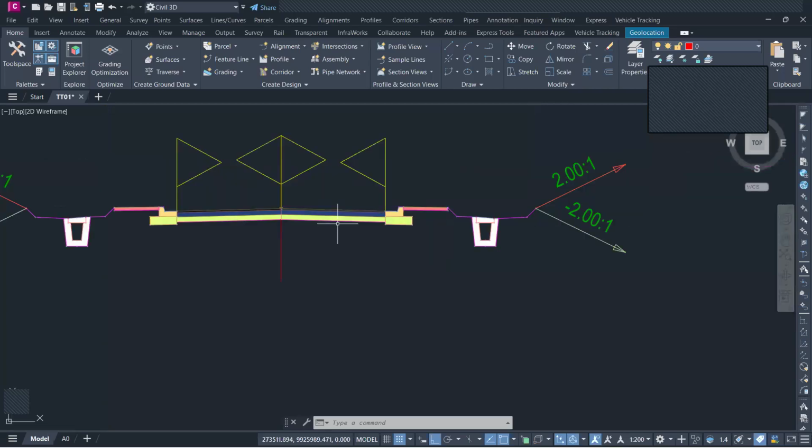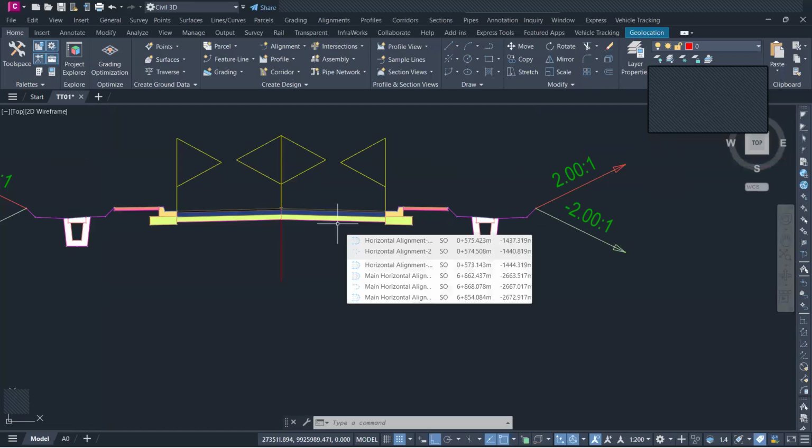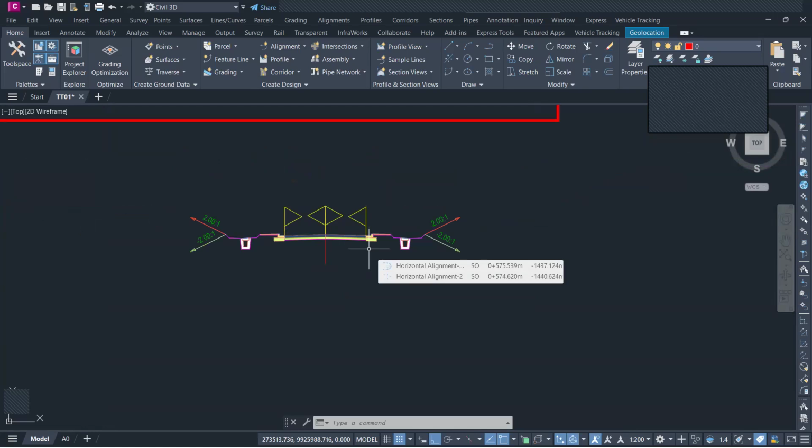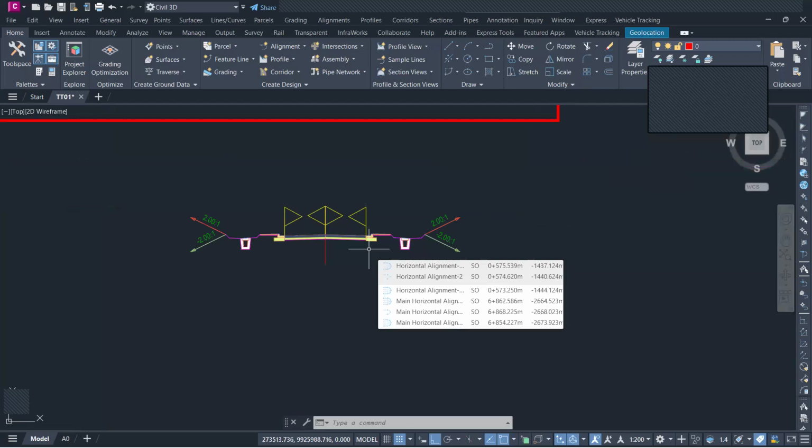We talked about the methods that we use. So there is the unit method, which I think is a bit more accurate. Well, it will take a bit of time for you to figure out all the unit items that you need for your project, both in roadworks and also drainage works and road furniture, and all of these items. But then again, also in building works, it becomes a bit more accurate. There are a lot of templates online that at least give you an idea of the quantities and items that you need to keep in mind and consider. And then from that, when you're doing building works, again, you mostly use the same.